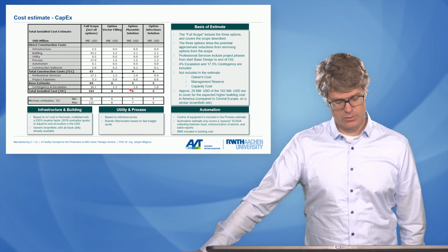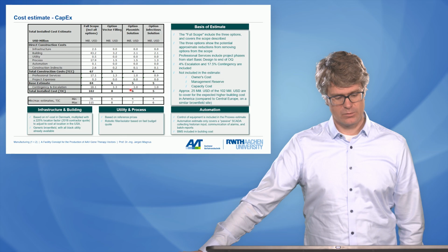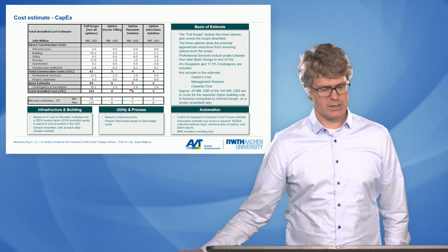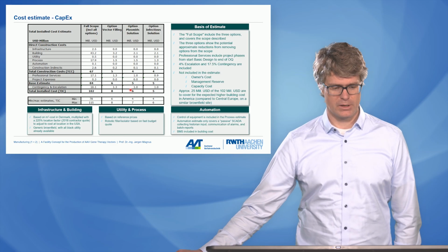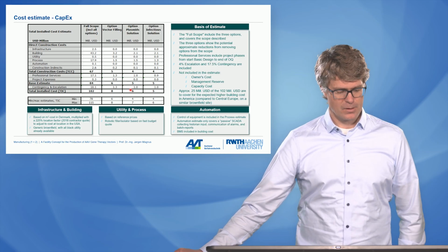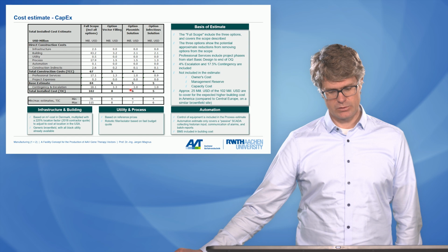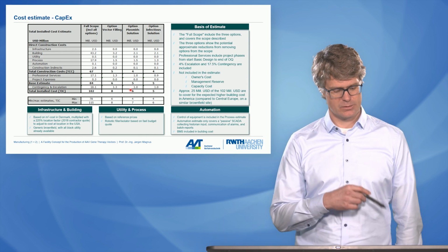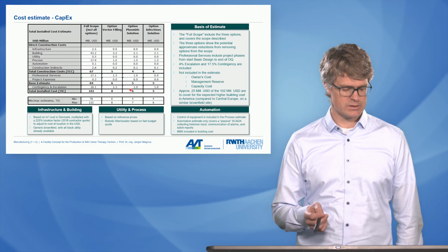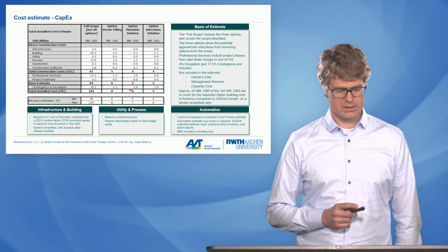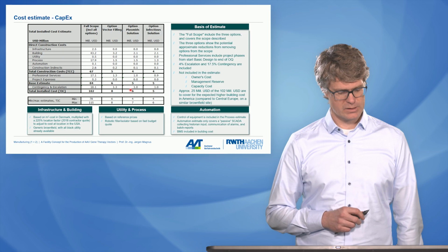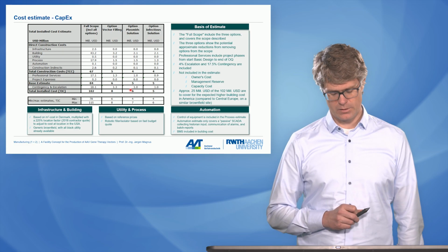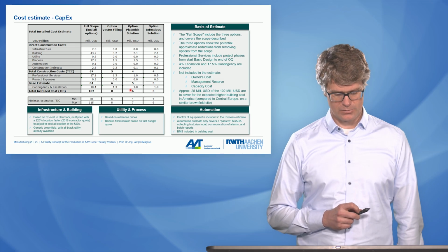The calculation here was done based on benchmarks from Denmark, where there's also a biologics hub, but it has been calculated for one of the major production sites in the USA, where there are also very high costs. So there had to be a location factor to calculate the cost in the USA based on the cost in Denmark. It's generally more expensive to build buildings there. And that also goes for the cost of personnel that we will look at now.